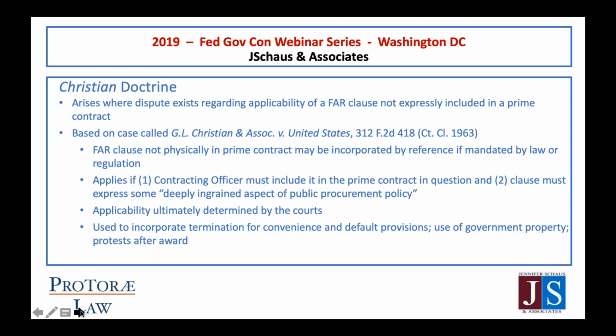My charges and my anticipation and benefits that came out of this lease were based on my view that the government made a commitment to be in the space at a certain price for a certain amount of time. In that case, the judge stated that no, the standard termination for convenience clause was actually implied in the nature of the contract, which was the lease, as a matter of law. And so the landlord was bound to it, even though it was not in its contract.